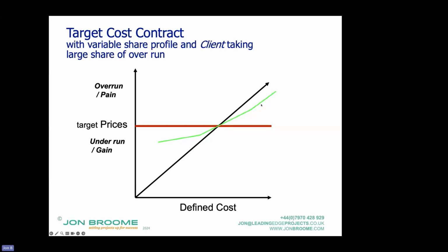And the contractor's share matched their fee percentage. So effectively it became at cost for the contractor. That looked bad on profit on turnover. But in this example, they don't want it to carry on overrunning because they're not making anything on it overrunning. It just makes their profit on turnover look bad.